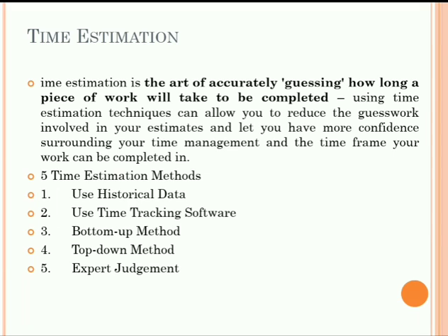The amount of project tasks, the duration of the project, time estimation, and schedules may define its overall price to a large extent, especially when a portion of the project cost is calculated depending on the worker's hourly rate. In this way, inadequate time estimation can interfere with your capability to create sound budgets and get credible cost forecasts.